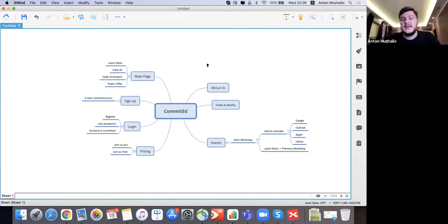If we estimate 8 hours per day, 1 person can complete the test case creation for this website in just 10 days. So design, create, document, and put all the test cases into the test management system. I can estimate it at 10 days, like 1.5 weeks. Does it look right to you? What do you think?